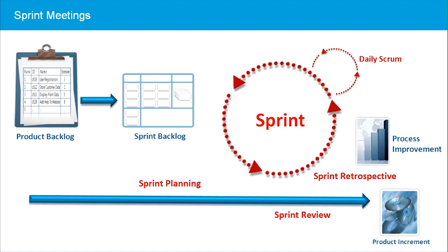At this point, the team commits to completing the work in the sprint backlog, which is frozen. No more items can be added to the sprint. During the sprint, the team owns the work and retains absolute responsibility for completing it in the manner that best suits the team.